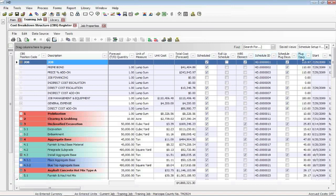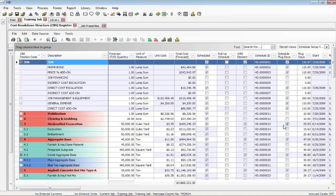This plug days over here are really the days and durations that the estimate generated when you put together your job. So these are the durations we will send out for you. The schedule plug days essentially allows you to change what durations you want to in fact send out to the schedule. You may want to use other durations. For instance, you had some cost items that were subcontracted. Well we don't know, Hard Dollar doesn't know what the durations are, so essentially you can put a check mark and say I want to use 10 days. So the schedule plug days allows you to override the durations that the estimate generated and what you want to use out in project.